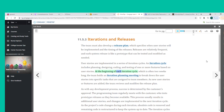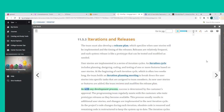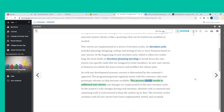At the beginning of each iteration cycle — which is often two weeks long — the team holds an iteration planning meeting to break down user stories into specific tasks assigned to team members. As new user stories or features are added, the team reviews and modifies the release plan. Success is determined by the customer's approval. The programming team regularly meets with the customer who tests prototype releases as they become available, often resulting in additional user stories.